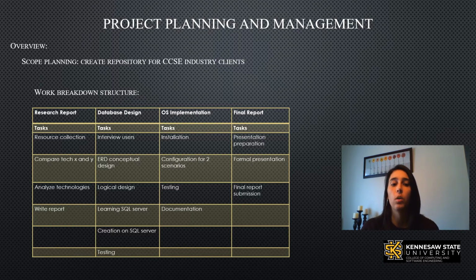Research report was broken down into 4 tasks: resource collection, compare technology X and Y, analyze technologies, and write report. Database design was broken down into 6 tasks: interview users, ERD conceptual design, logical design, learning SQL Server, creation of SQL Server, and testing.